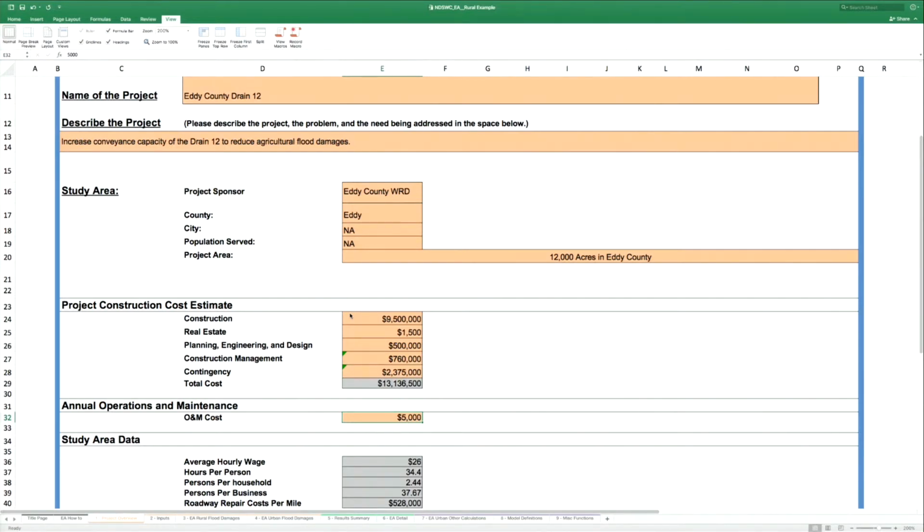We plugged in some labor hours for the different activities. We figured fuel and time to go out and mow. It's pretty straightforward to put together an O&M estimate for something like that. The reason I say that is because coming up with an O&M estimate isn't as hard as a lot of people think it should be, or is. So keeping in mind what we talked about here today, with the level of detail and sufficiency to come up with a reasonable estimate, you can do something like that with O&M.